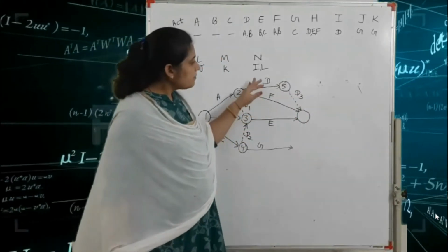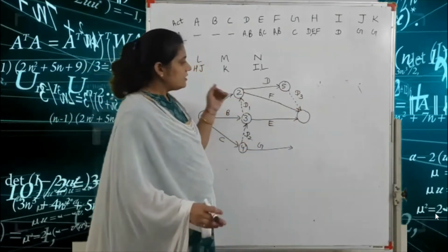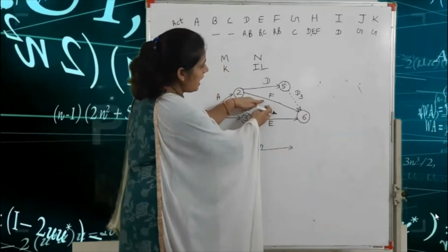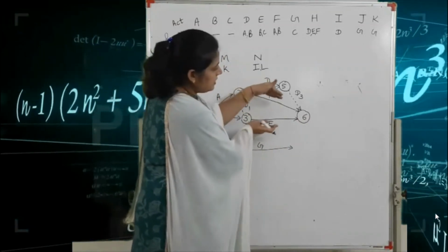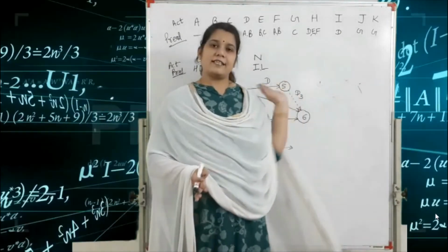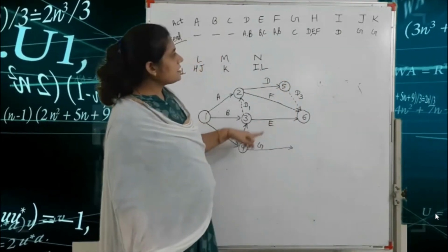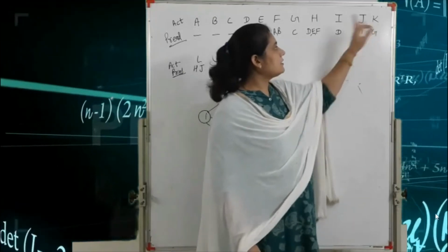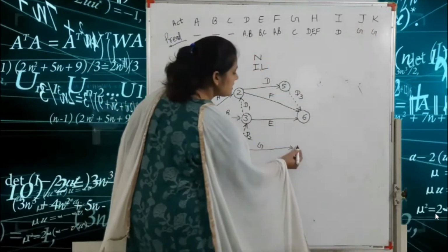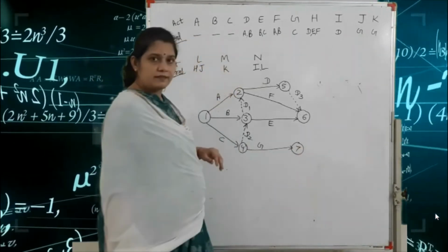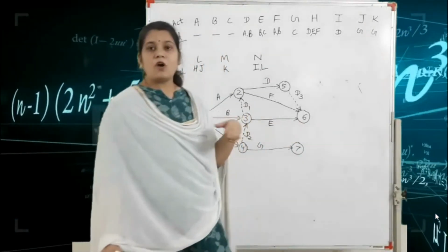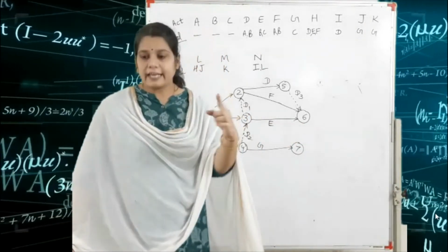So what is the meaning of this merge event? The meaning is that E, F and D activities are completed, after that the next activity starts. Here the G activity is completed, then the J and K activities start. So again G is completed, that means we write here the 7 node. We draw here two arrows for J and K activity.